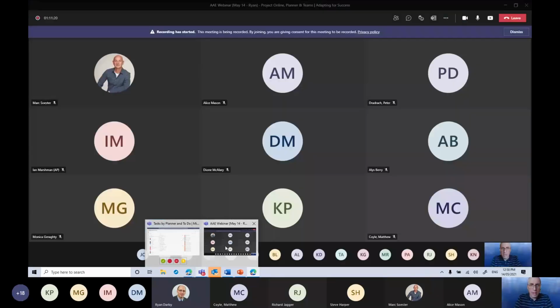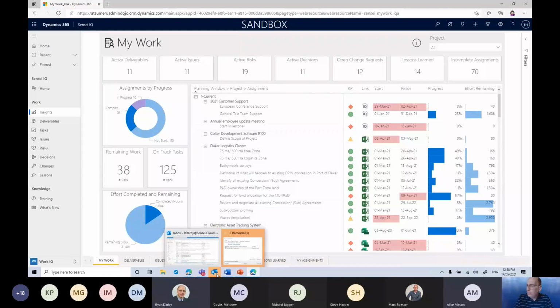Okay, Alice, in the last minute, any other questions? A couple more. We've got one that came through the chat. Can I update a task in Planner and see that update on Project Online? With a somewhat more complicated flow, or Power Automate, you can, but you really need to think about if you want to do that. Updating a schedule, if it's your schedule, it's okay, but lots and lots of people now updating your schedule through Planner, that could annoy you. So you need to make sure that from a process perspective, you think that's a good idea. Just because you can technically do it doesn't mean you should.